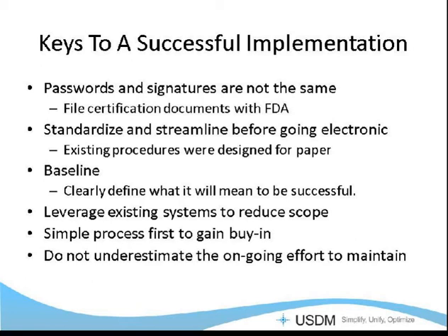Also, I would suggest that you start very simply. These things can grow exponentially. There's a lot of effort involved. There's one example in a lab that I worked in where we decided to use automatic pipette calibrations as our proof of concept, and we saved about 5 hours per month. Doesn't sound like a lot, but it was a very simple thing to do. It took an hour to create a method, and we did a simple validation of it, and then we had the 5 hours to show the types of savings that we could have and also get people familiar with the system.